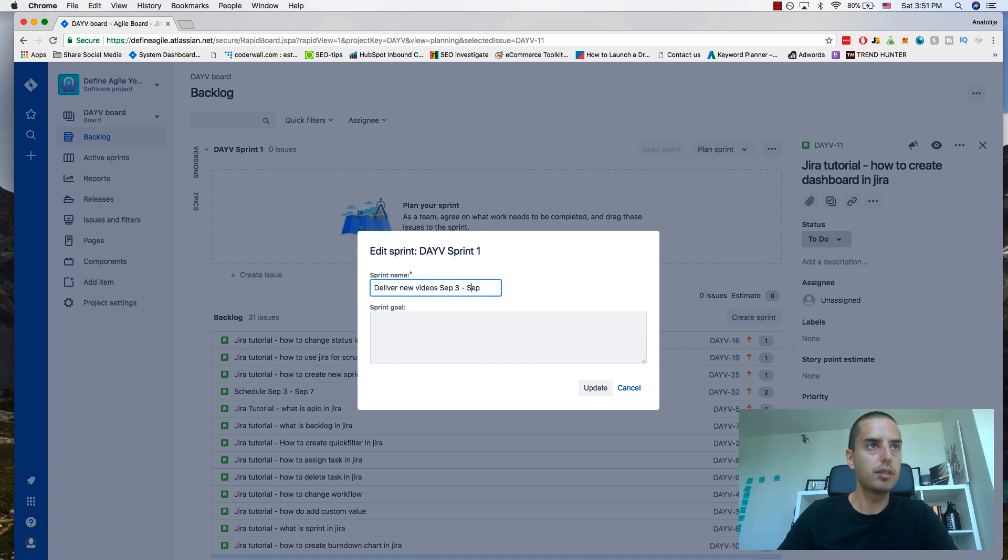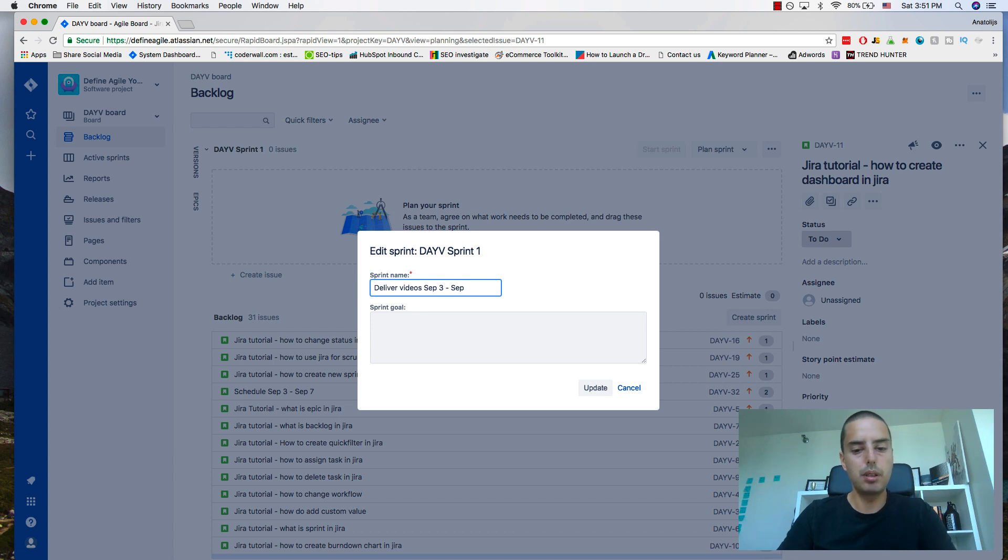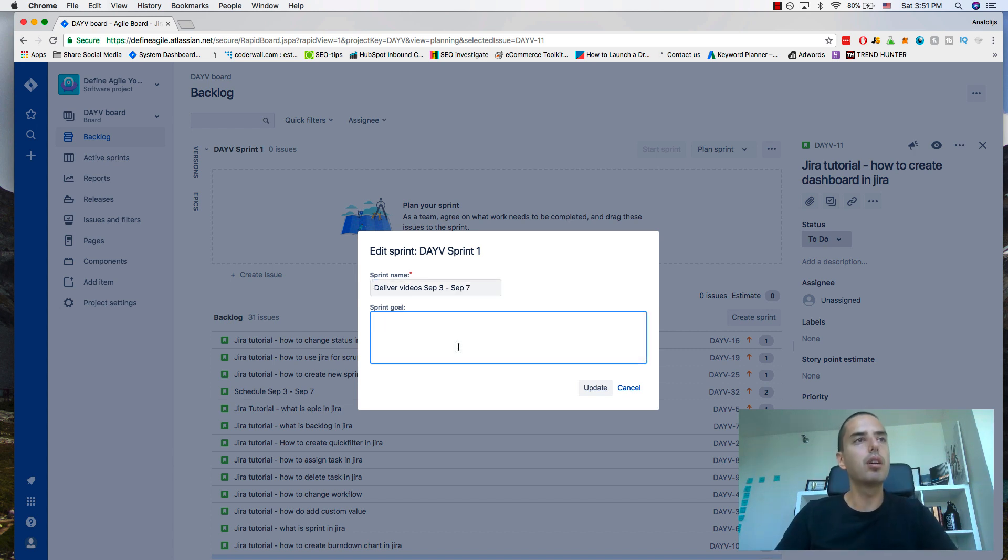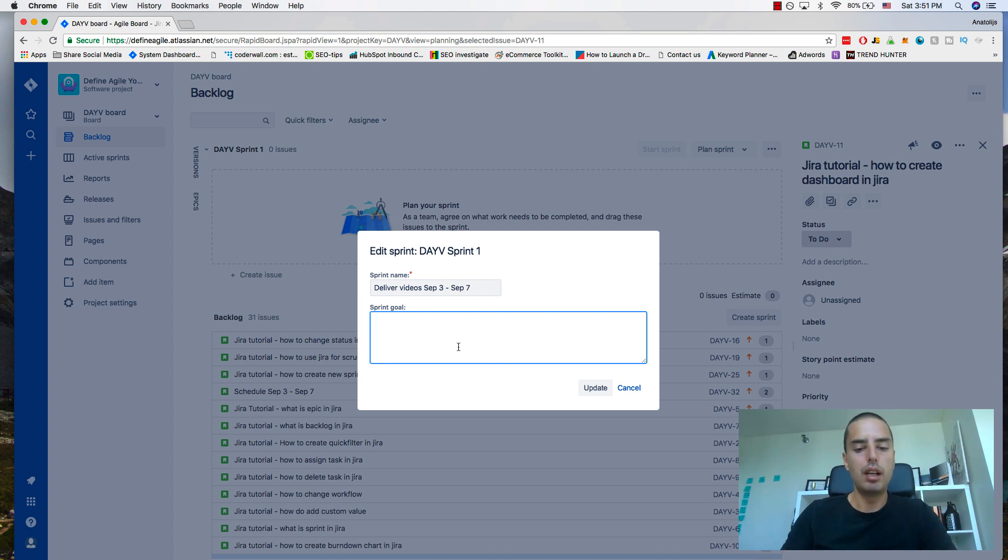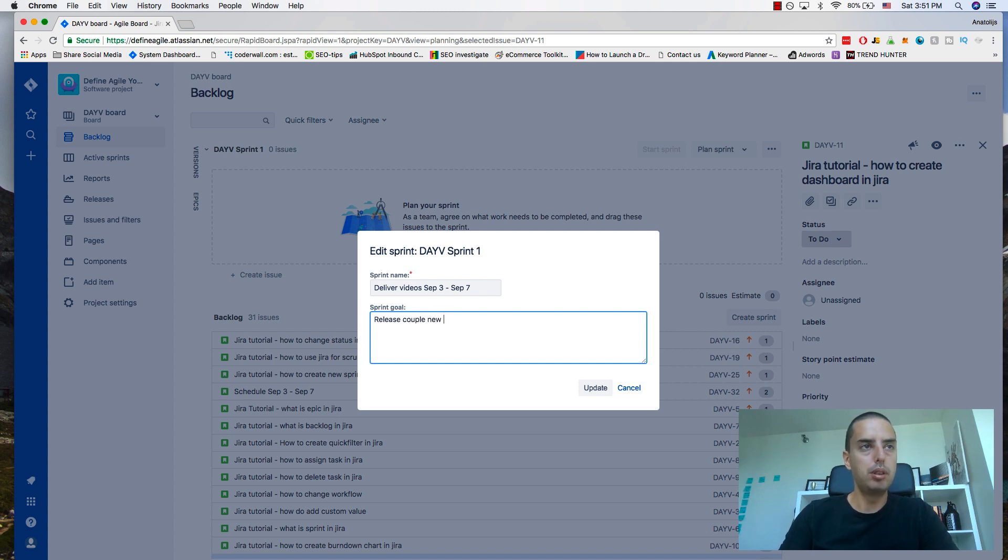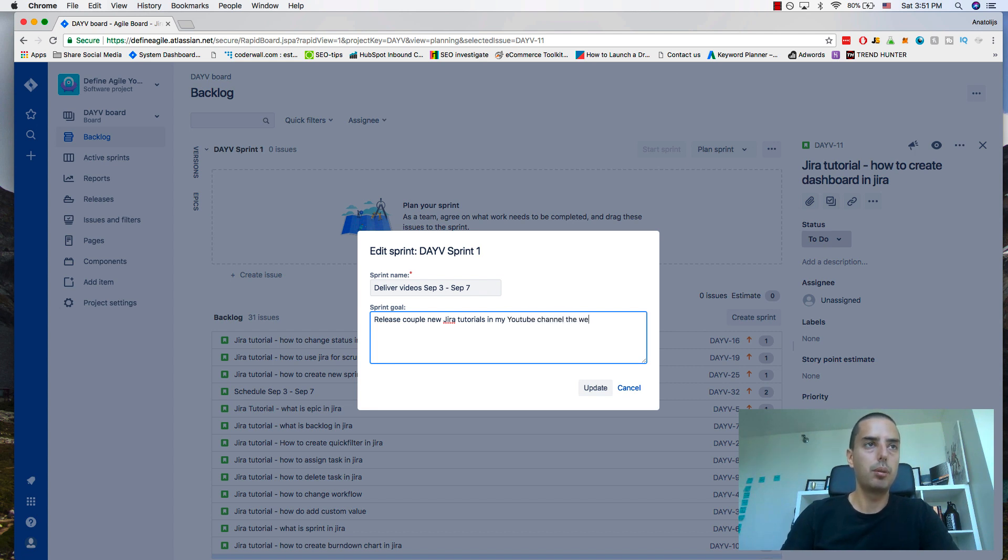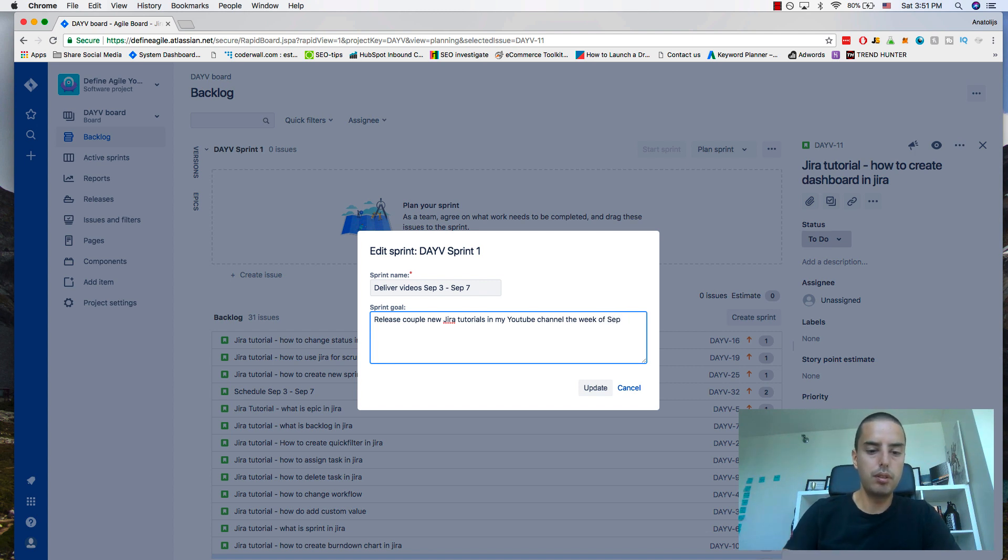Deliver videos September 3rd to September 7th. The sprint goal is to explain what exactly I will achieve. I can put here: release a couple new Jira tutorials on my YouTube channel the week of September 3rd to September 7th.